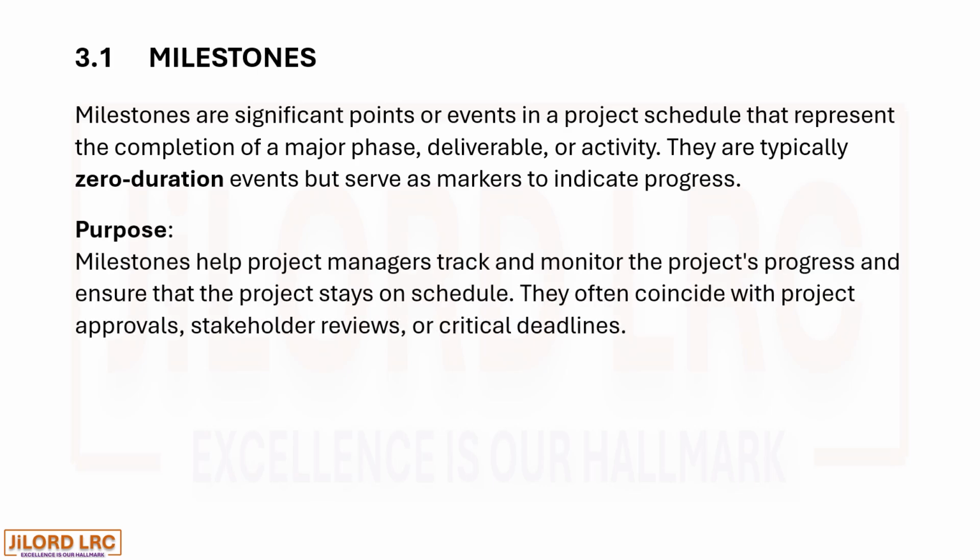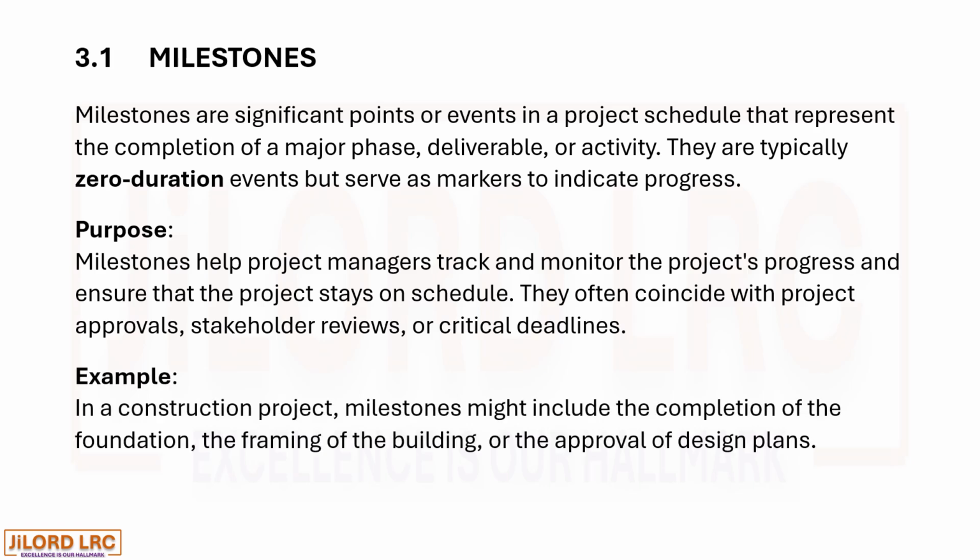Purpose. Milestones help project managers track and monitor the project's progress and ensure that the project stays on schedule. They often coincide with project approvals, stakeholder reviews, or critical deadlines. For example, in a construction project, milestones might include the completion of the foundation, the framing of the building, or the approval of design plans.